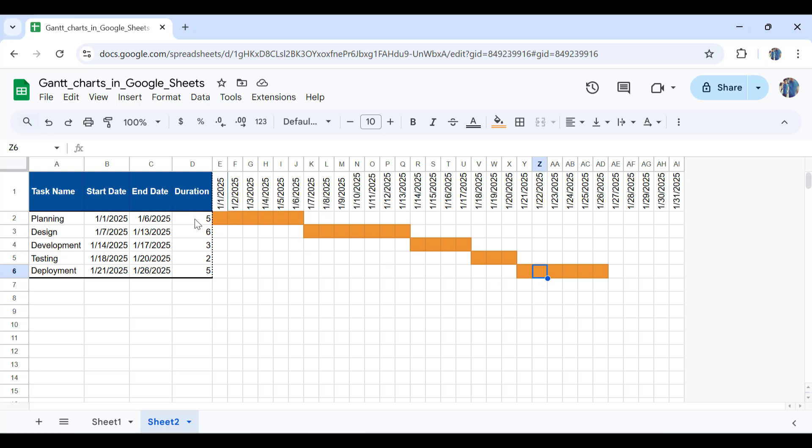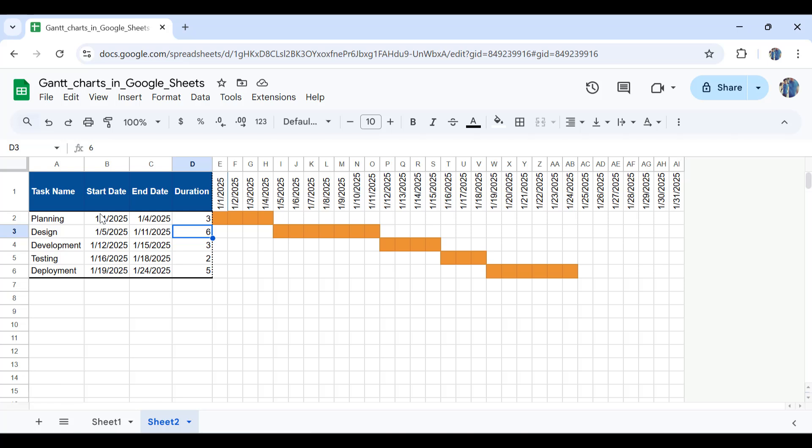If I make changes, for example, change the durations—make this duration three days—as you can see, everything moves. The reason is that what I have done is for the end date, I have added the start date plus this duration. And for the start of the next activity, I have added one day to the end of the previous activity. Or in project management, we call the previous activity predecessor and the next activity successor.